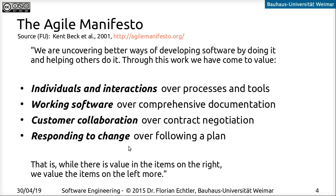Last but not least, probably the most important principle: responding to change over following a plan. If you follow a rigid plan, you either have to stick to it even when requirements and environment have changed, or you have to adjust the plan constantly. It's better not to make a big master plan upfront, but to plan tiny steps and respond to change as it happens. These four things are basically the foundation for all the actual methods we'll look at later.